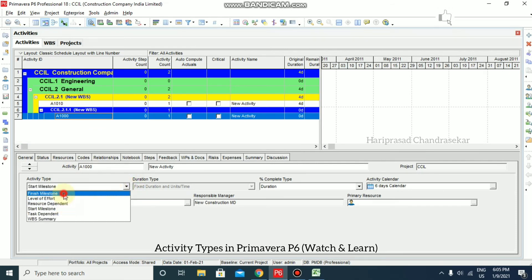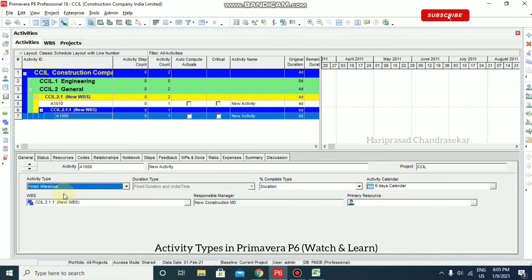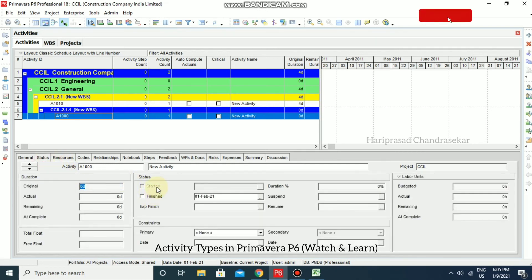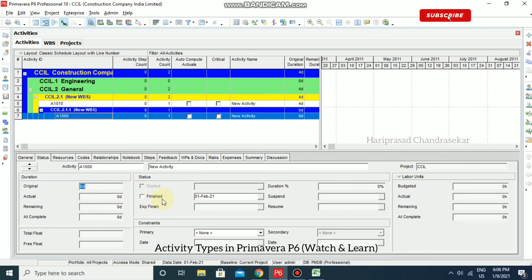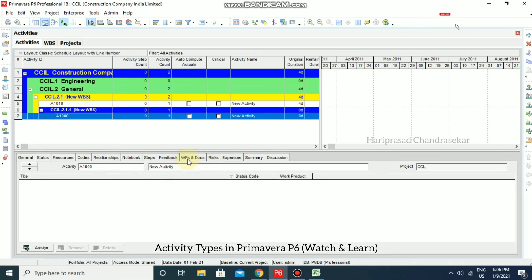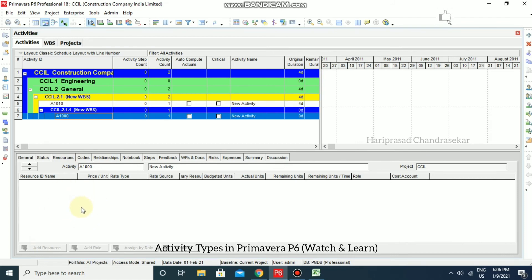Finish Milestone is typically used to mark the end of a phase or to communicate project deliverables. It also has zero duration and only has a finish date — whereas Start Milestone only has a start date. You can assign constraints, expenses, and work documents to a Finish Milestone, but you cannot assign resources, as that option is unavailable for this activity type.